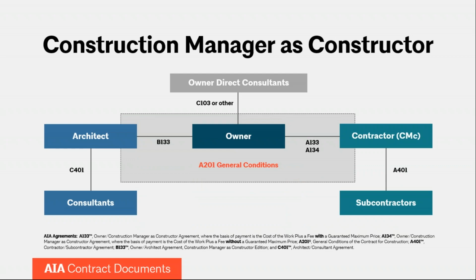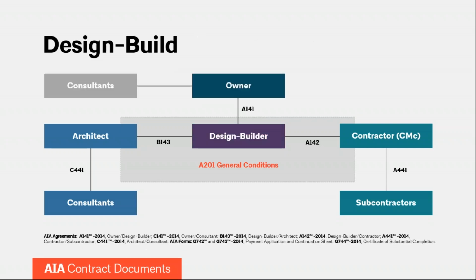The construction manager as constructor delivery method has been steadily growing in popularity. This is probably because it enables greater collaboration between the architect and the constructor, known as the CMC, during the design of the project. As with the design, bid, build, delivery method, the A201 document is used. Sal, I think you're next.